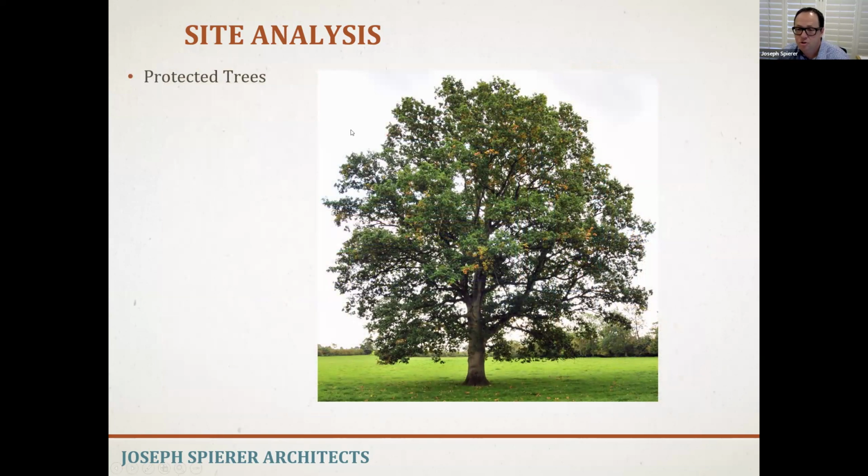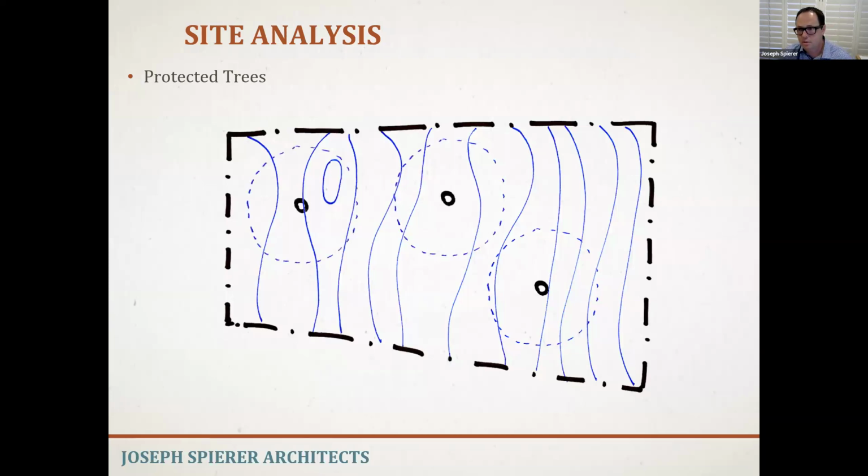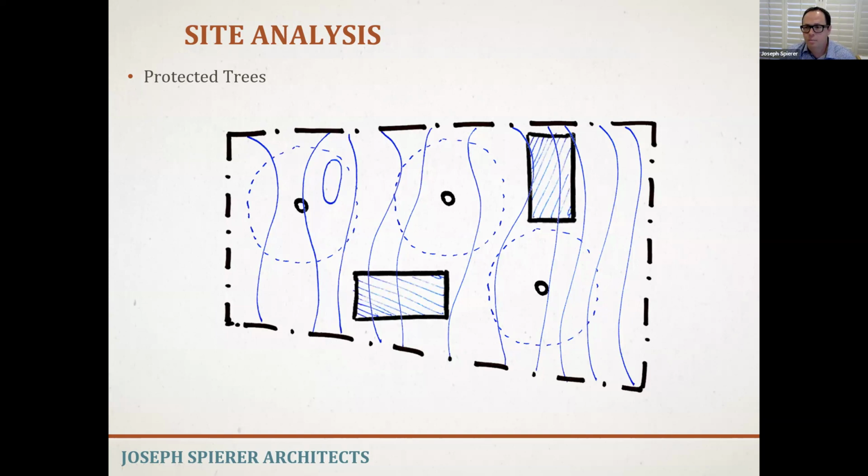Then you also have potential protected trees to worry about, right? So we had a lot in LA that we were called out to analyze, where there were 3 protected oak trees that needed analysis. And what they thought is, well, with the protections here, we're only going to be able to put a home here, and that's not going to work for us. So we did some research, and we figured out that it would take the better part of a year, 9 months to a year, to get these trees removed before you could actually start on a submittal to the city. They said, no problem, we're going to go for it anyway. They went for it, and we ended up designing a home on that lot. Which Sophia, by the way, we should put in this presentation so that they can see the final product.